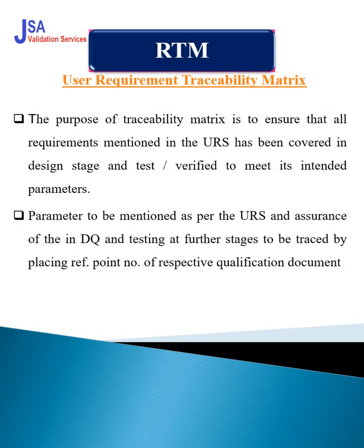So there is no issue, you can club both activities together, but it is better to go for the SAT also if you have the FAT punch list, so you will not face further delay of the activities due to some shortcoming in the system. Okay, or if you identify something not done at a later stage, you have to verify all these requirements in the SAT.